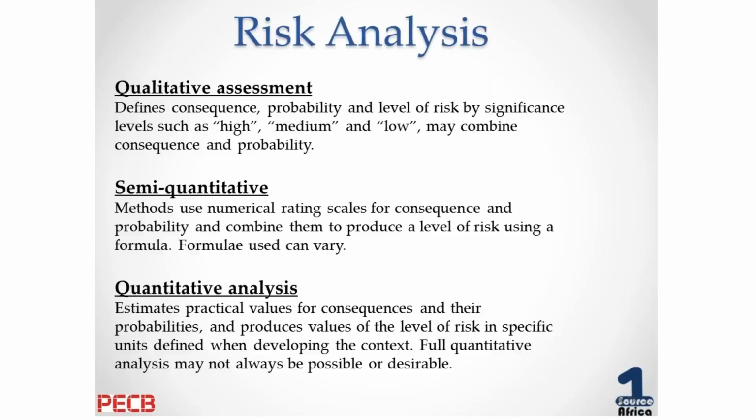But the one that is really imperative to us is the quantitative analysis. The quantitative analysis is where we try and put some numerical value to it, normally defined as a loss of money value. We want to try and understand, should a risk occur, what that occurrence would cost us. If we understand that, we would have a much better idea of how much money we can spend to manage the risk or fix the risk.